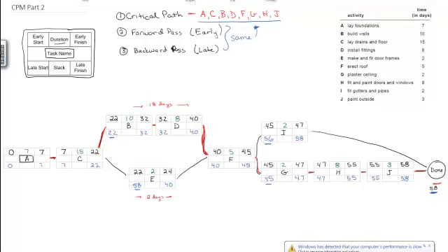So then the final thing that I'm going to put on this is float. I guess I'll do that in green. Is calculations for float or slack. And this tells me, well, maybe I don't really need to do this at a certain time. Maybe I can shift it forward or backwards in the schedule. Maybe that would be helpful to accommodate manpower or accommodate resources. And so it's helpful to know if I have any ability to move this task within the process.